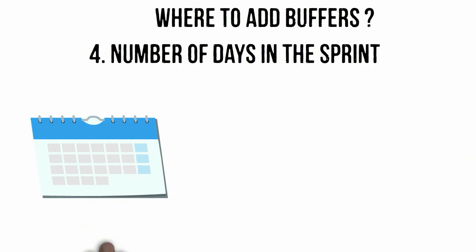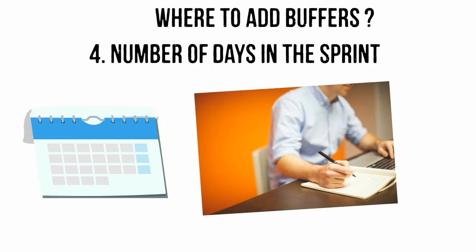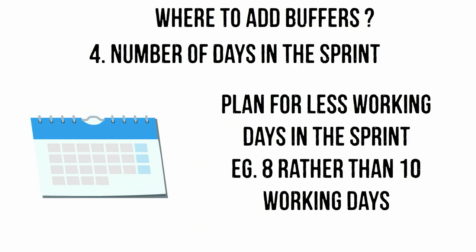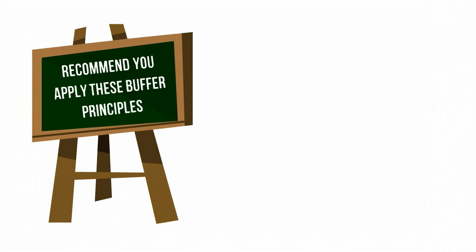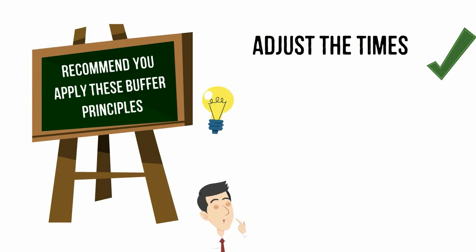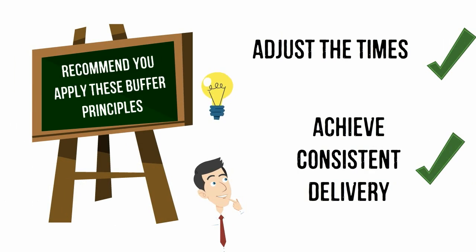4. The number of days in the sprint are usually modified to reflect planning, a known consistent amount of time for meetings and recurring impediments — for example, 8 working days rather than 10. I recommend that you apply the principles above and adjust the times until you achieve a level of consistent delivery.